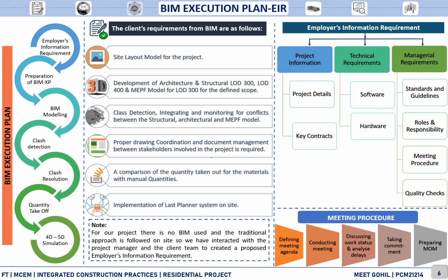Meeting procedure is defined as defining the meeting agenda, conducting meetings, discussing work status and analysis of the delays occurred on the site, taking commitments from every stakeholder, and preparing a minutes of meeting format for every meeting.